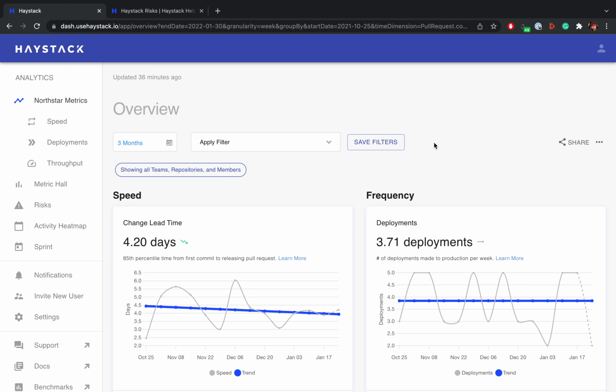In my last video, I covered how you could effectively identify where the bottleneck was in a software development team, specifically by starting with cycle time. Then we're able to drill into what is the largest component of that. It was review time. And then from that review time, we're able to understand that actually the rework time is taking the most amount of time, and understand the process risks which were actually delaying that. So we're able to go from North Star metric right down to leading indicators and then to risks to understand where these bottlenecks are. But these bottlenecks are different for every single team.